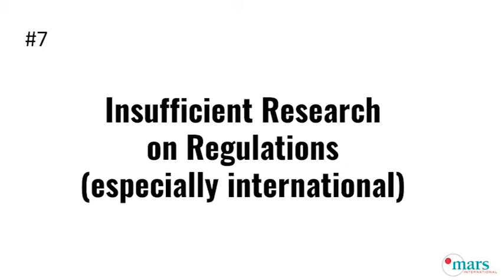We're doing that right at the moment, where a product that we designed to sell in the US and Europe, which we were told is where it was going to be, and now they're moving into Asia, and Asia has some different regulations for some areas of the product, and we are having to redesign it just so they can sell into that market. So if you can identify that early on, then you can make some judgments. Okay, it's going to cost me a little bit more to design it for all these, but I know for sure I'm going to do it, or I'm not going to do it. At least you're going in with your eyes open. So number 7, insufficient research on regulations.